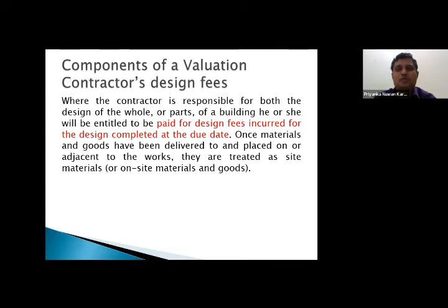Now you understand the mechanism behind that, because whenever there is a design defect, the client or the employer is affected. In the consultancy services agreement, the employer has been named as the client, therefore you have to call it the client here. You can see the design fee of 5%. There is a logic in keeping that 5%, in order to cover any design deficiencies. Now, in the absence of a design portion from the engineer and in the presence of a design portion from the contractor,